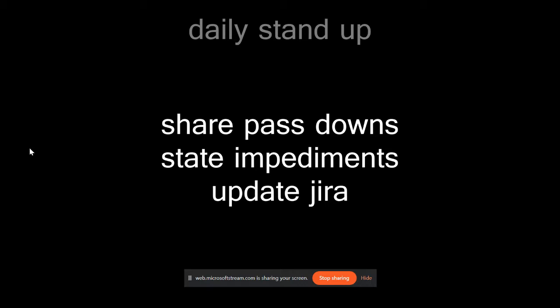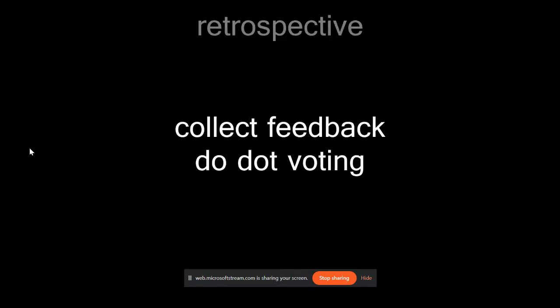So some of the things I've tried that have worked, sharing any pass downs or key communications that you have to the team. That way the team is kind of prepped for the day. And also if there's any questions, maybe I can knock them out in the chat beforehand, right? We can have team members state their impediments, maybe get those knocked out as well before the daily stand starts. And updating Jira. Definitely updating Jira is a super low hanging fruit as far as building that context for the team members, like what am I even working on today? And also making sure that we're not doing those updates in the meeting. And that can just be very painful.